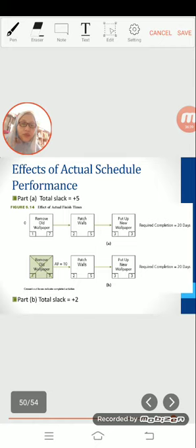You can sum the estimated duration for the three activities: 7 plus 5 plus 3 equals 15. Suppose that activity 1, remove all wallpaper, is actually finished on day 10 rather than day 7 as planned, because it turned out to be more difficult than anticipated.